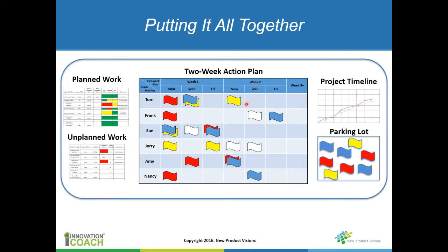So he might have some new tasks that he needs to add, so he's going to talk about what he's done since the last meeting, what he needs to get done over the next few days, and anything that's hindering him from getting that done. So that's the first part. Note that the priority on these tasks is really going to be driven by the team member, but it can be discussed within the context of the stand-up meeting.